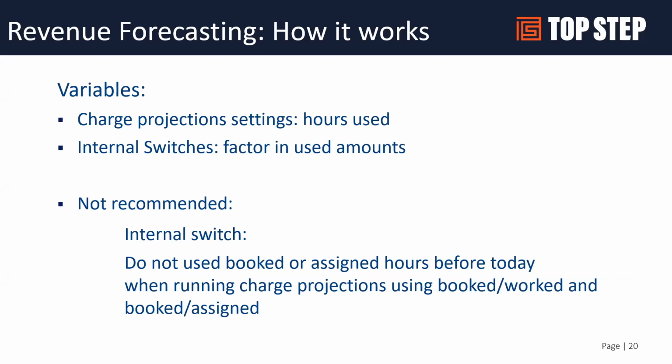And that might sound good, but the only way this switch is really beneficial is if people are entering their time religiously daily. And if people are not entering their time daily and are instead waiting till the end of the week to enter their time, then you're going to cause gaps in your forecasting process with this internal switch. And I don't know of very many organizations that have achieved daily time entry as a best practice. So we generally steer away from this one. So be careful with this one.